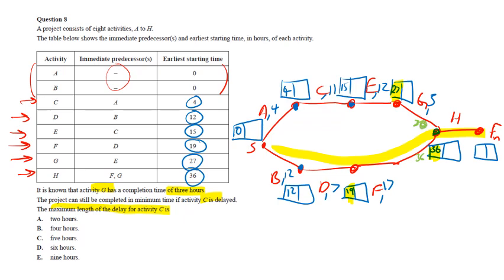We've got this 30 here in terrible writing, and we've got a 36 here. The difference between those is 6 hours. And that is the answer D. There's a difference of 6 hours. So just building up the diagram and realizing what would be in the other competing lines. Quite a simple diagram in the end. And you got the answer 6 hours, which was D.